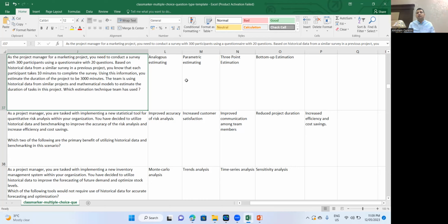Let's say each activity was 1 day and there were 4 activities, then the whole work package will take 4 days. Similarly, you do it for all the work packages. The estimate goes from the bottom to reach the top. So you add all the bottom activities, and you are moving from activity to work package to control account to deliverable, and deliverables to the project budget. So you are rolling up, adding up, aggregating up. So it's bottom-up.